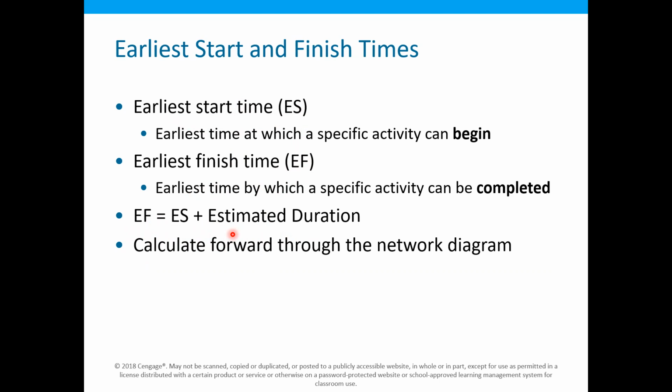So if, for example, the activity is to start on Monday and the duration is 5 days, then the earliest finish time will be on Friday. Because from Monday to Friday there are 5 days, that confirms our answer. With Monday as the first day, the activity completes on the fifth day.